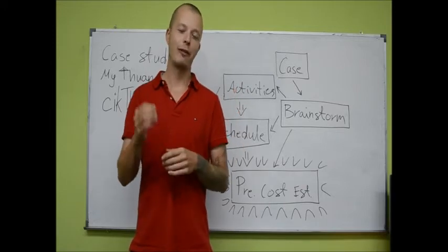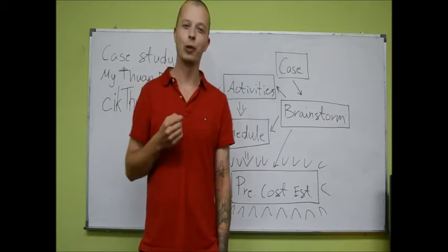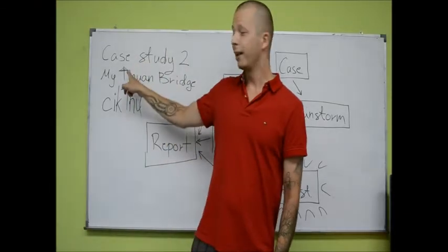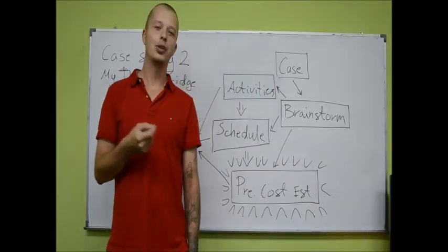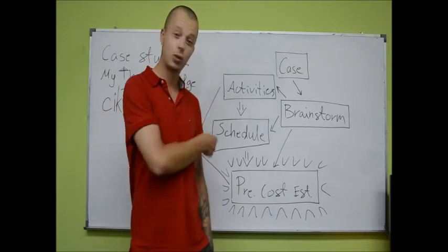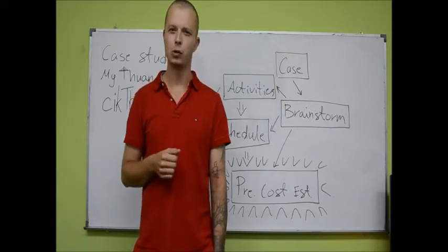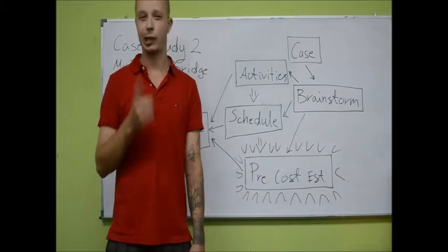We were lucky enough to find a reference on the internet from the Malaysian Board of Engineers that said if you have a total project of a bridge like this, the real bridge, not that one, then we should divide it up to about 2 to 3.3% of the total construction cost. That amounted to, I think, about 1.1 million and 2.2 million for phases 1 and 2, as well as phase 3 being 9%.